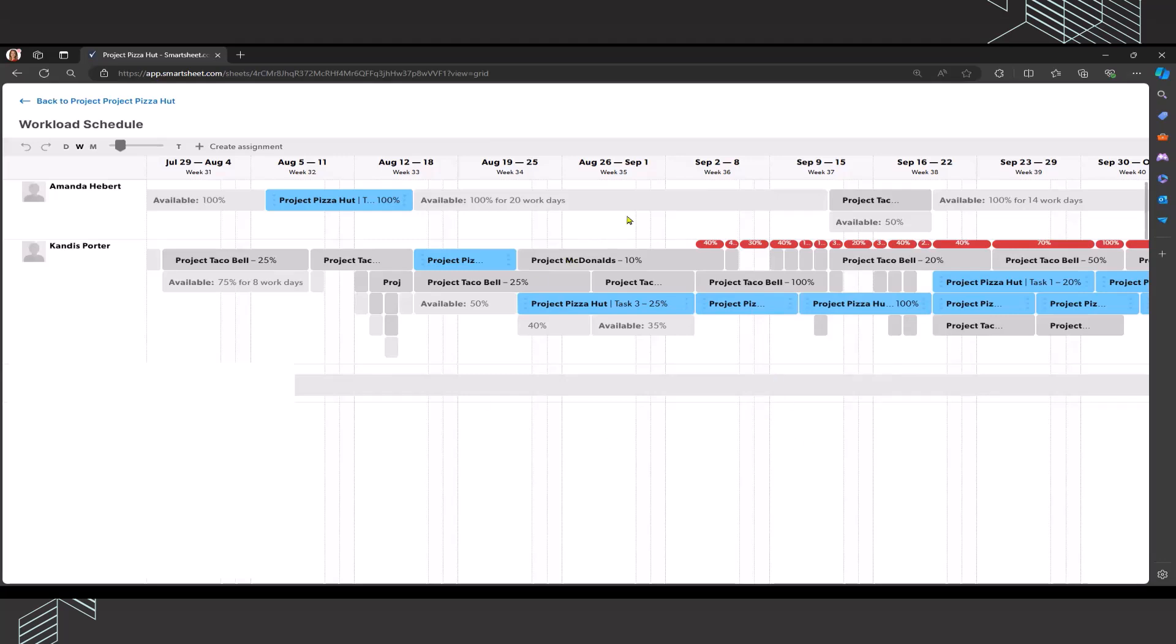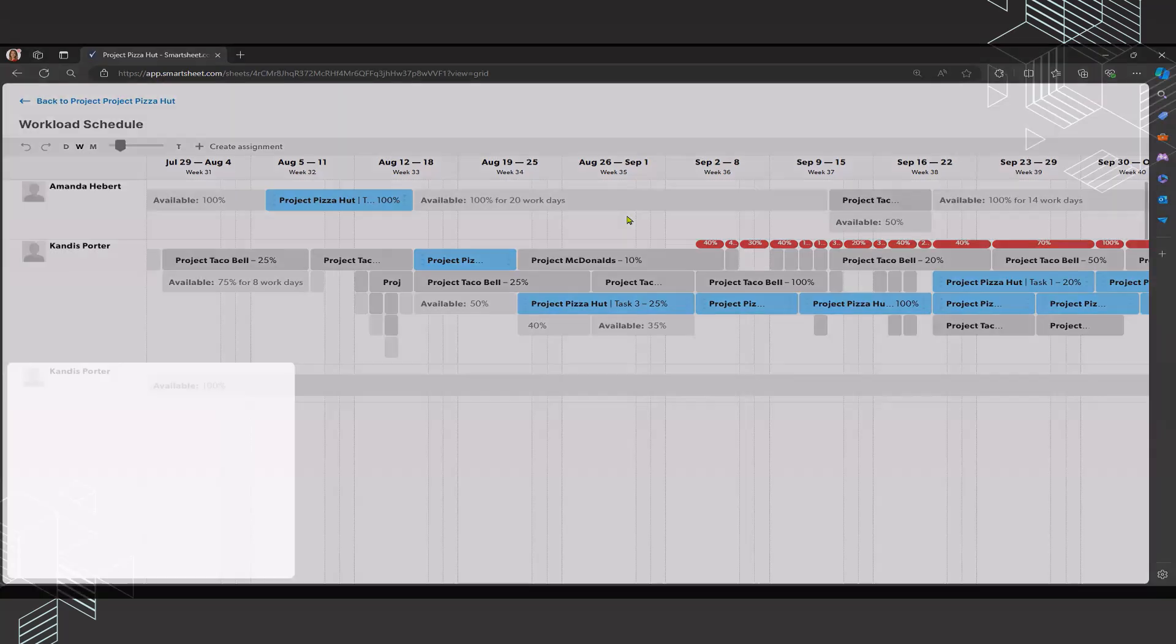What is their availability for project work? If someone only has 50% of their time each week that can be set aside, so let's say that's 20 hours if you typically work a 40 hour work week, then we need to make sure that we're communicating with them and their managers to understand that so that we're not piling project work on top of their operational work to where they're over allocated in that way.